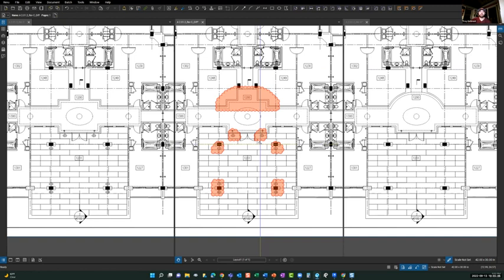And the reality is that in a world where we're building these 3D models, you can change one thing and it changes 6 other sheets and you don't realize it. So they make a change and they cloud it where they're working on it, but then they don't realize that it switched those other sheets, so they don't get clouded out there as a change. So as much as it's annoying, I'm here to say I don't think they're doing it on purpose.